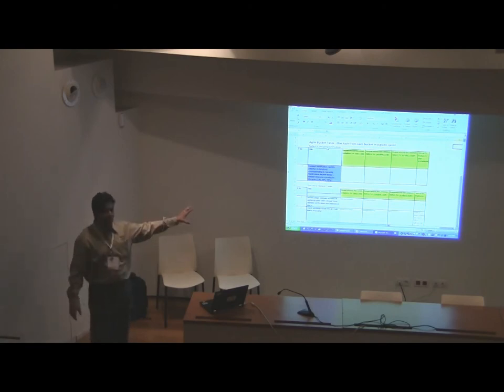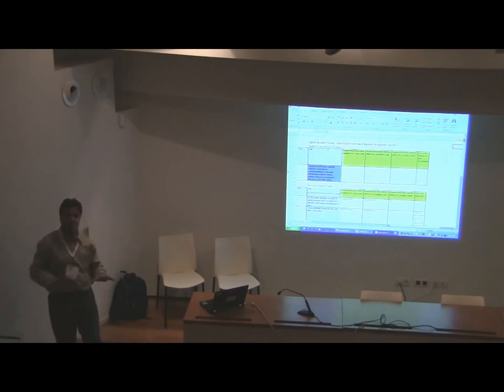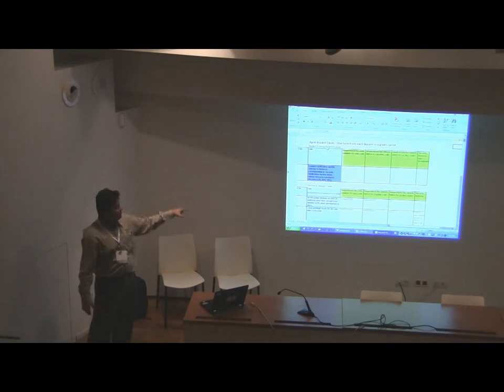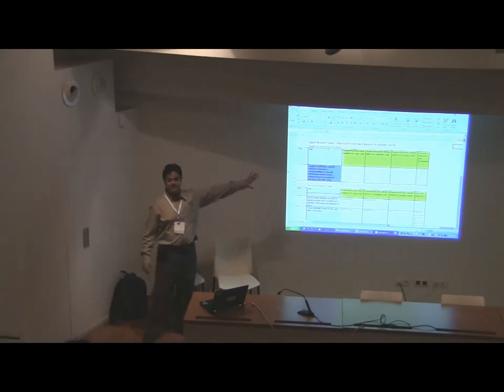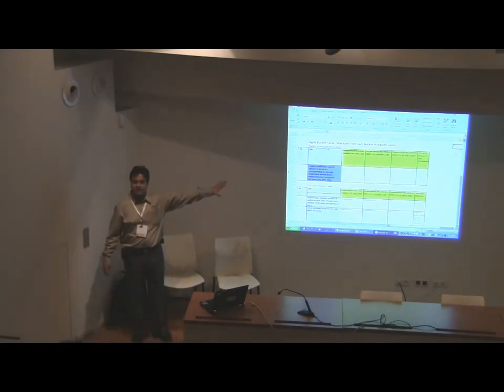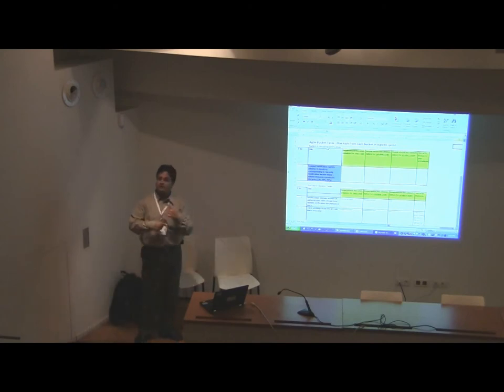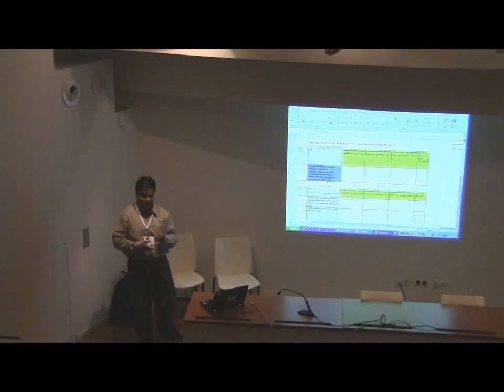So they are important, but they're not as important as the every-sprint tasks, right? So what you do is you go to each of these buckets and you pick one task from each of the buckets and do it in that sprint. So here also what we realized is that there is a security verification bucket. Most of those verification tasks could be folded into that. And we identified certain new tasks as well, right?